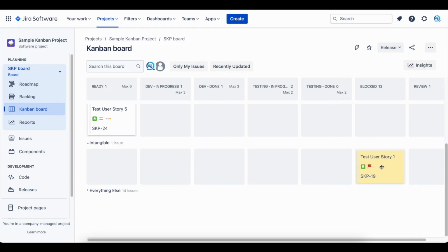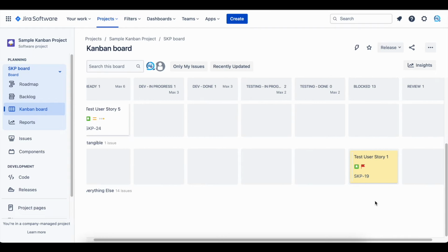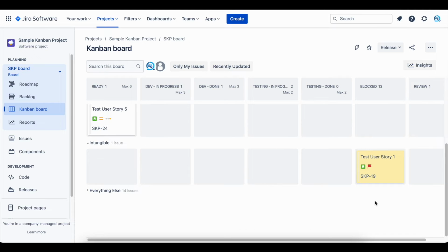As teams run into blockers, they move the card from the In Progress column to the Blocked column. The issue is that blocked columns artificially allow you to raise your WIP limits, which defeats the entire point of having WIP limits. A blocked column is an anti-pattern in Kanban. It breaks the entire point of managing flow and removing the impediments that are halting the workflow.